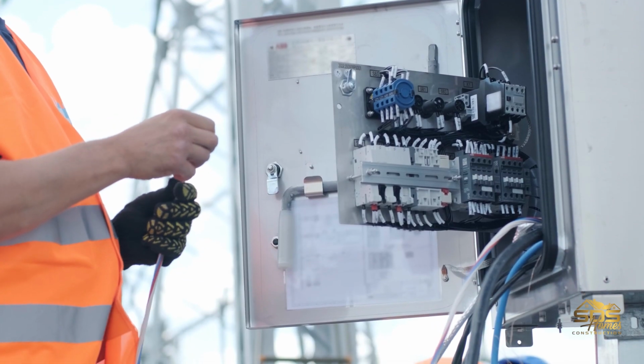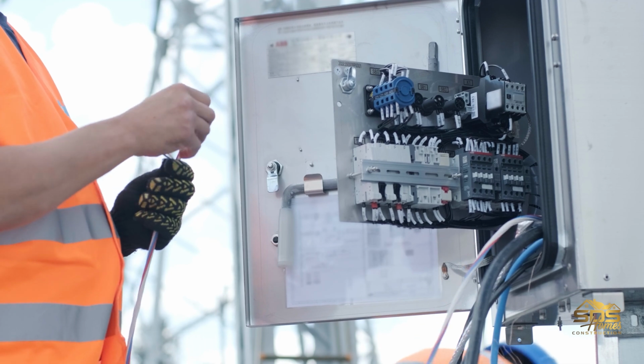Correct. And then you've got your water pressure. How far away is it? All that kind of stuff. And then your electrical meter, the box itself. If you have neighbors, most likely there's one close by. But if you're the only house in the area, dun dun dun. That's why it's important when you're looking for land, you call up the utility company and ask, is there a box there? Try to figure things out so you can keep costs down a little bit.